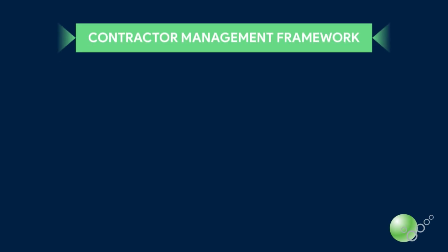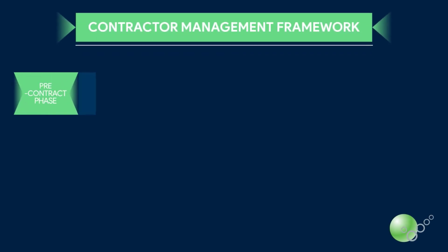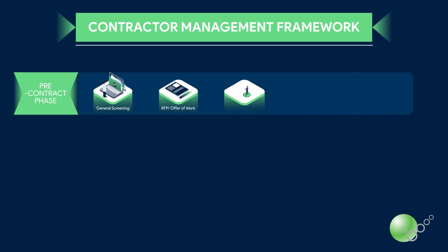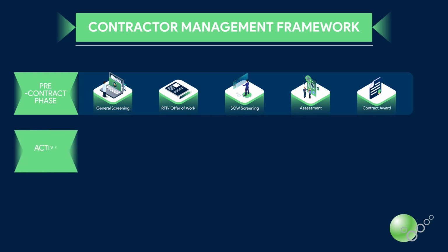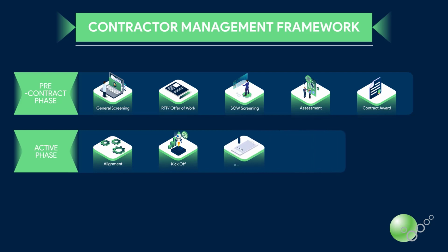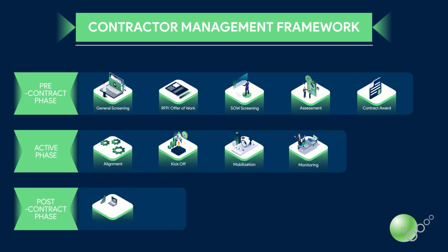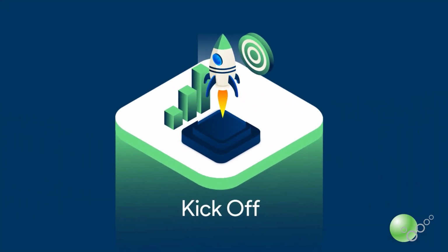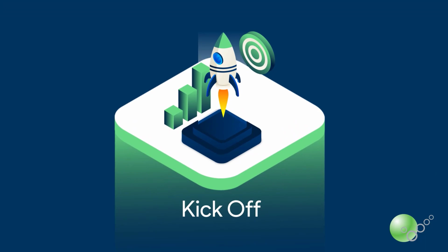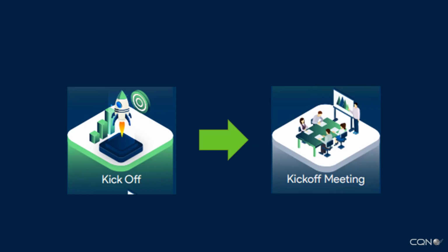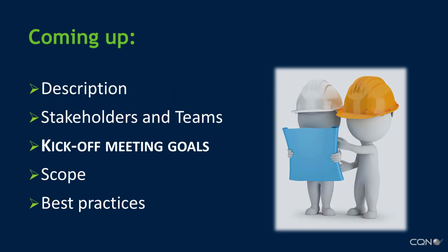To get started and to get our bearings, let's look at the contractor management framework and where the kickoff meeting sits in the bigger scheme of things. Kickoff is in the active phase of the contract, after alignment and before mobilization. The meeting is frequently guided by the contract documents and any alignment activities that have taken place after the contract has been signed or when putting a mobilization checklist into place.